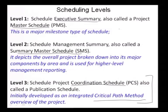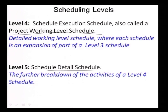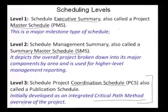There are projects where people try to schedule at level 4 throughout, saying more detail is better. But you run into problems — you cannot do level 4 schedules from the beginning, because you cannot anticipate some of the activities required at that level of detail. Up to level 3 is a must right at the beginning, but level 4 and level 5 details develop as you look ahead.